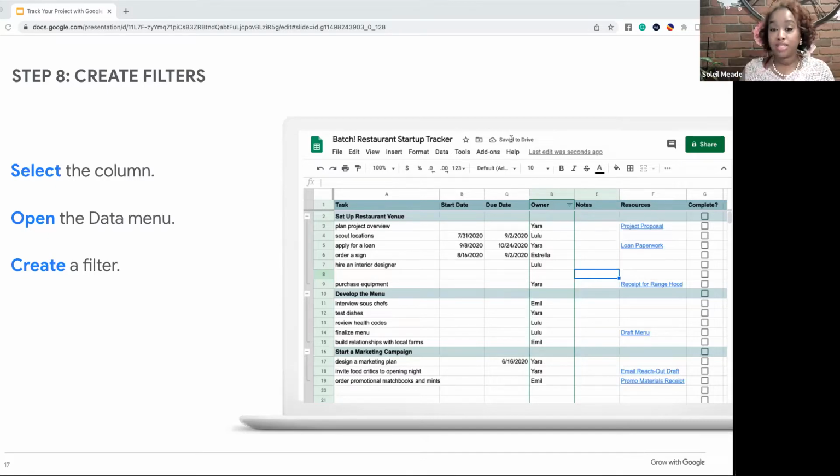And then when I create this filter, all of the tasks that are connected to the marketing team will show up. If I created a finance team, then all the tasks for the finance team will show up. And then I'll be able to see, oh, well, the marketing team has completed almost all of the tasks that they've been assigned in this workflow. Let me follow up with them to give me report outs for that. And you maybe add that task. And we'll get into comments later, because then you can add that task and share it and collaborate with them and insert a comment that tells them to send you the deliverables or a report. So filtering really helps you to fine tune information that you want to see.